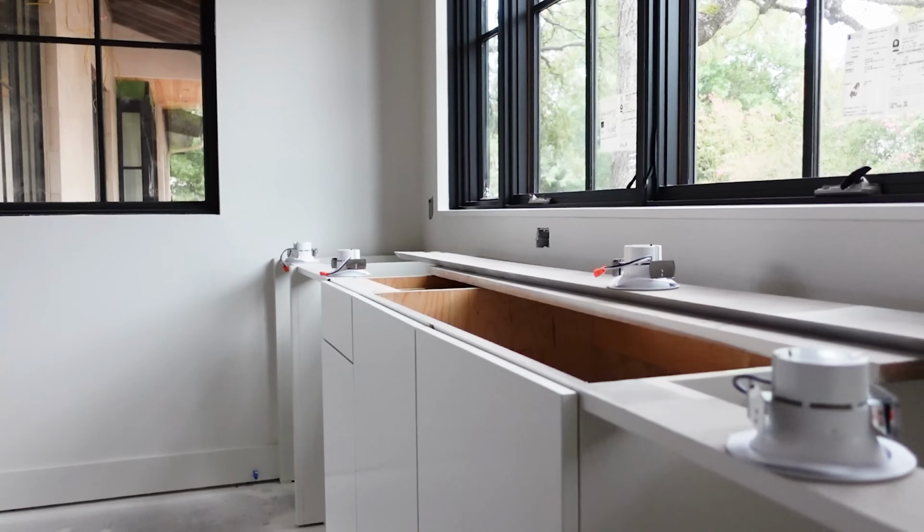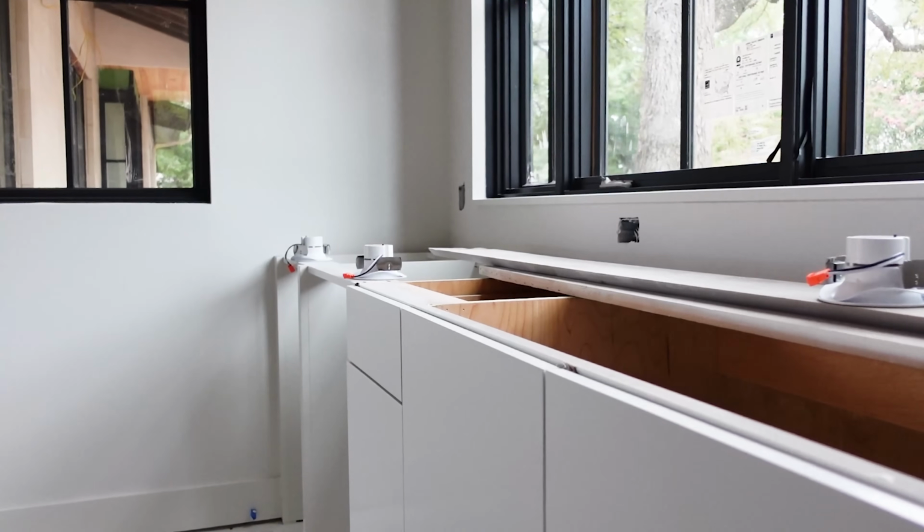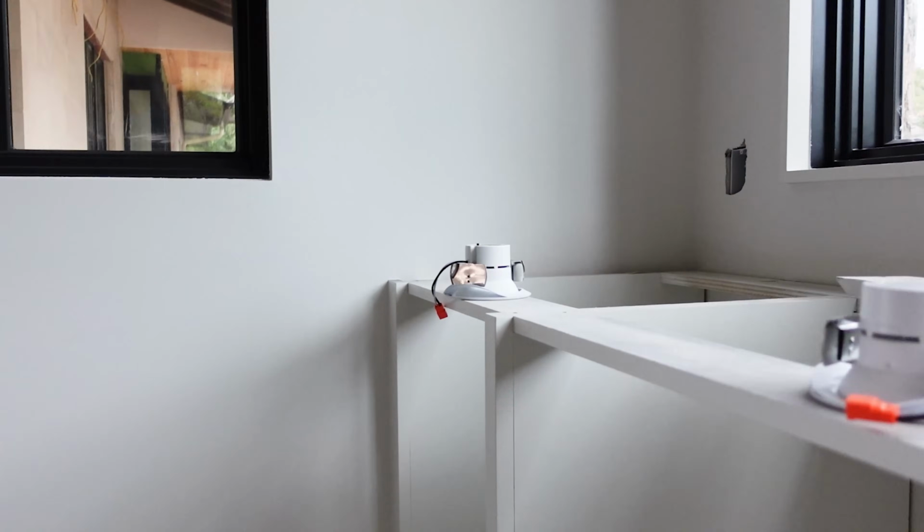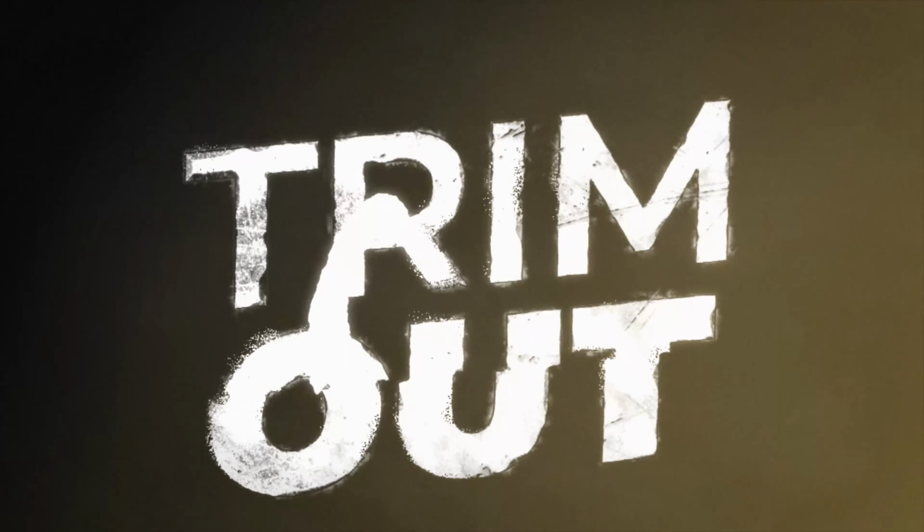Then once you have all of the finished cabinets, a lot of times you'll have to spray like a lacquer, or you'll have to paint or do something with the cabinets. Once all of that is done, then they typically bring the painters in, and the painters will do a final finish. They'll do a first initial primer coat throughout the whole place, and then they'll add another coat of paint. They'll usually spray on whatever the color the walls are going to be. They might do 1 or 2 runs through the entire building to make sure that the finished paint is ready. And at that point, they will usually call the MEPs back out and say, now it's ready for the trim out phase.